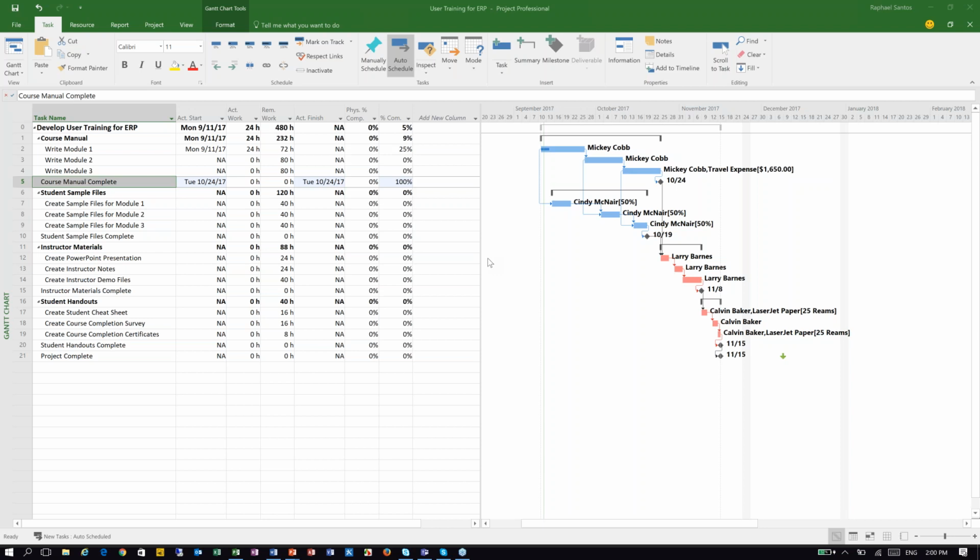The information is going to be stored as soon as you copy from your interim plan from baseline 0 to baseline 1. I only created the baseline 1 table because if at any point you would like to see what's the information that has been stored in the baseline 1 fields, that is the place where you go and look for this information.